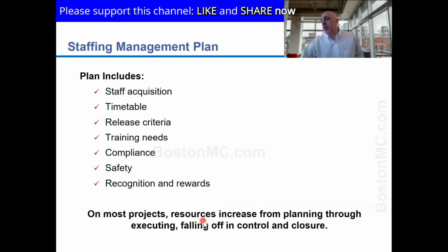On most projects, resources will increase from planning through execution. In planning, it's a slow, gradual build up, doesn't really build up too much. But when you go into execution, that's when everybody needs to be on the project, like on the day of the move, and shortly after, you will have lots of your resources busy with all of the partitions and desks and other things that are happening with the wires, the networks, and so on. And then monitoring and controlling, once all is done, it just falls off at that point, right? That's the controlling point.